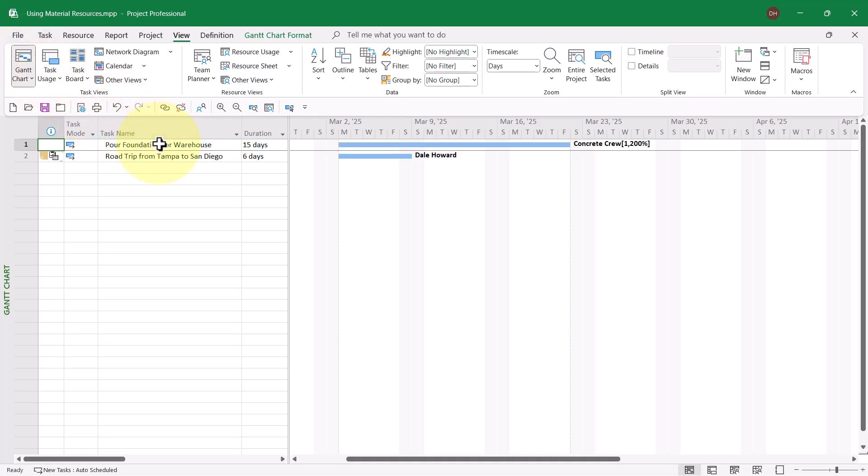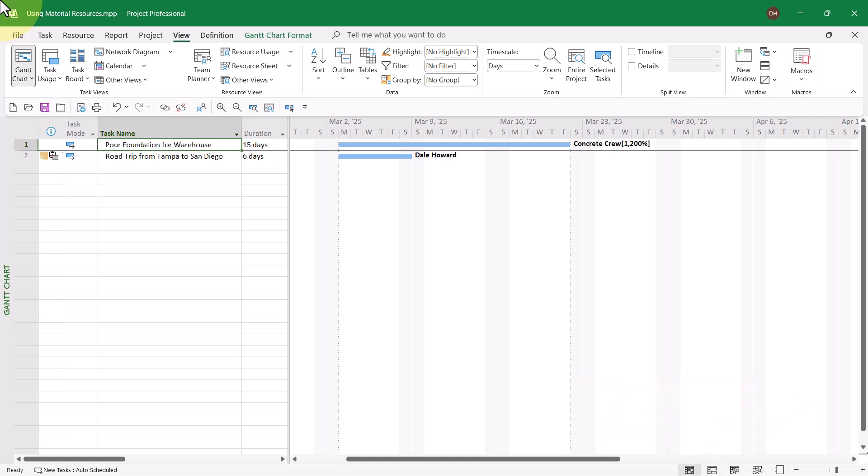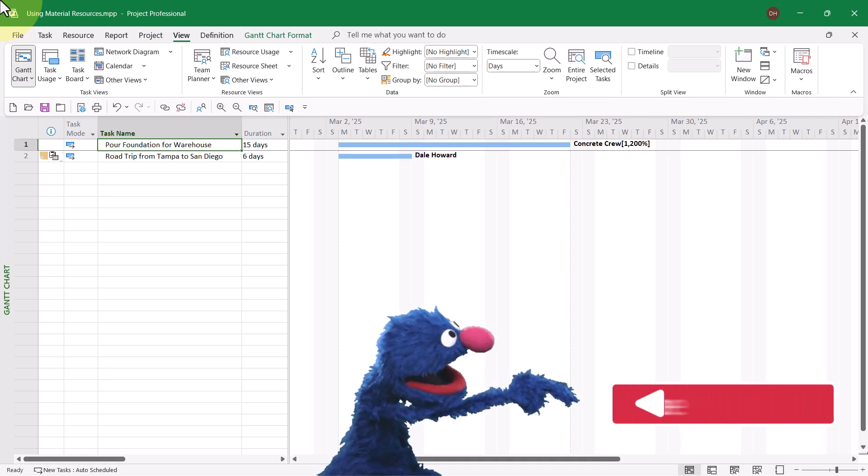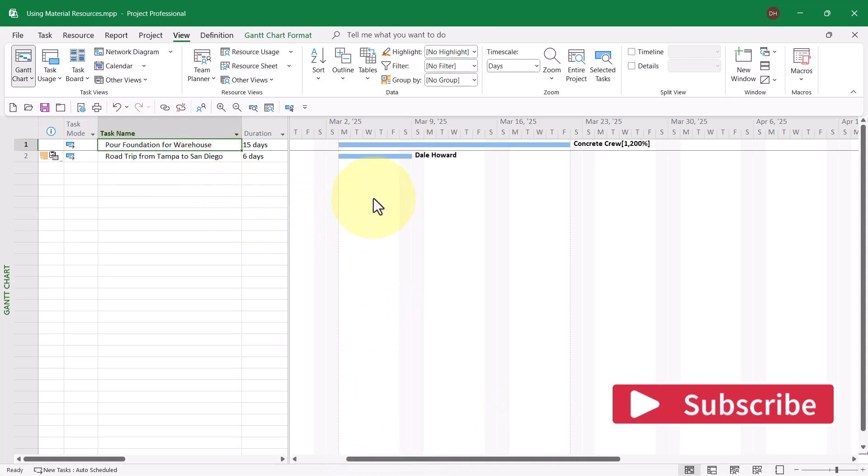That is exactly what is going on with my first task in this project, Pour Foundation for Warehouse. I have a very reliable estimate of how much concrete we will need to pour the foundation. And that amount does not depend on the 15 days duration. Therefore, I definitely need to use the Fixed Consumption Rate for assigning my material resource concrete.